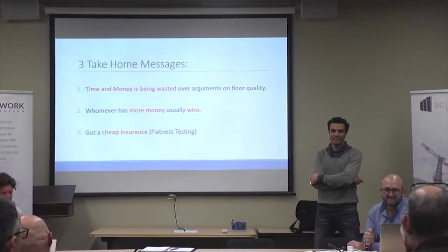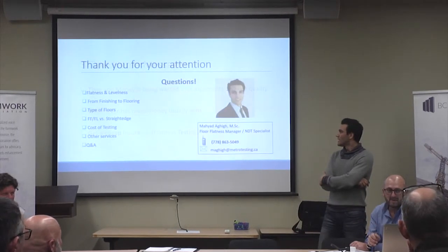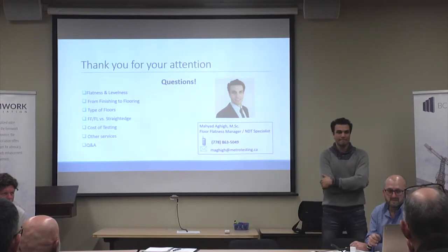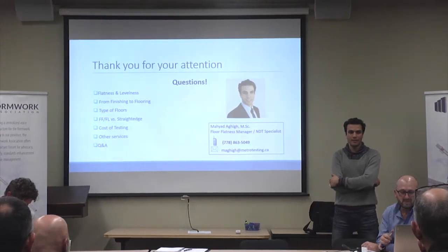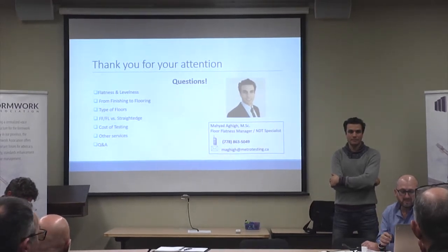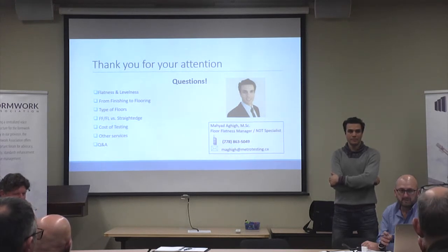The spec has to spell it out, so you've always got that to refer to. You'll end up in court. Judges don't know anything about construction, and most of them absolutely do not. So those guys are not going to debate the issue, they're just going to look for black and white, what they call specific performance. And if it's in the contracts in the spec, done. If you've got that written in, you're gold. And somewhere in the middle will now lie the answer.